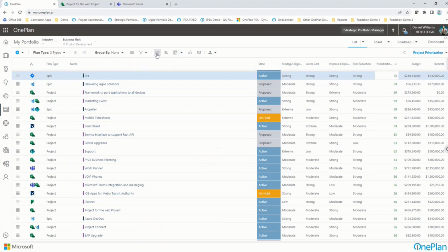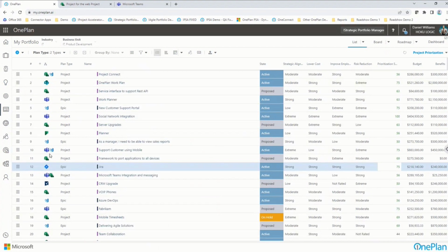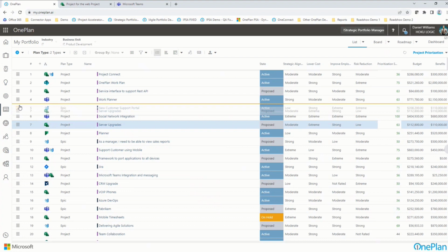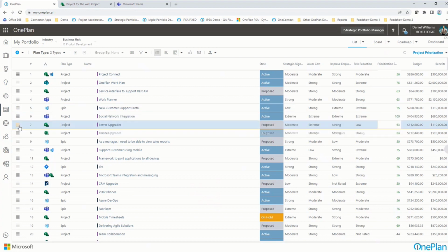You may have your own forced rank on this. And if I put that in place, you'll see that I have a rank from 1 down through whatever number of projects that I have here. And notice that they're not in prioritization order, because I might want to take a project that, say, is ranked number 7 and say, management prerogative, regulatory, whatever it might be, may want to drag that to be number 5. And the idea is I can make these force ranks happen and use this as the basis for my prioritization when I do my what if analysis and other types of analysis.